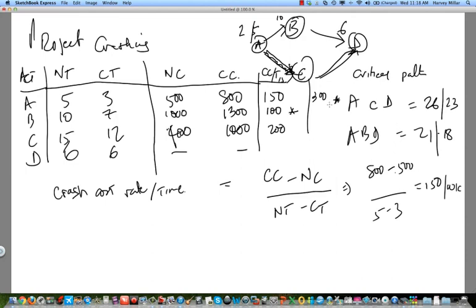But C only has three days to crash. So it will cost us $600. All right? And when we crash that by three, we go from fifteen days now to twelve days. And so now we have two and twelve, it's fourteen. Fourteen and six is twenty. So we're able to bring this down to twenty. This still remains at eighteen.